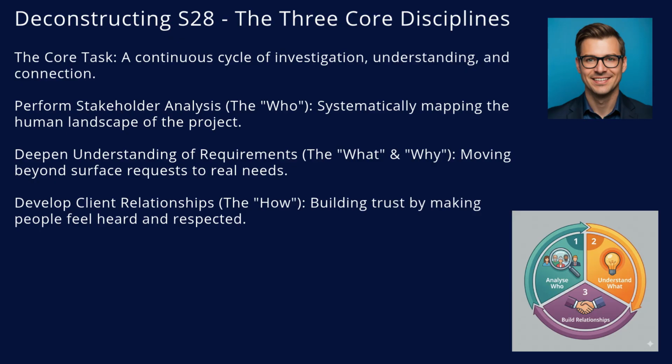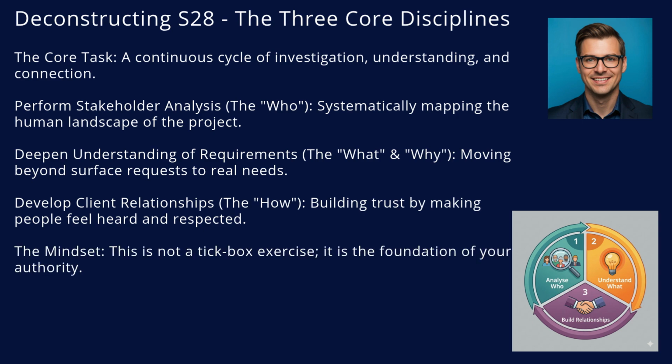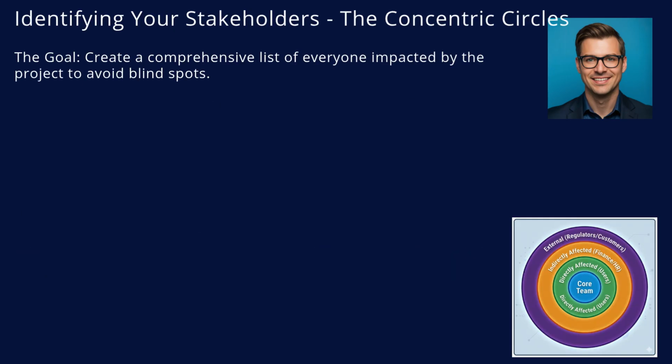By making people feel heard, you build essential trust. Adopting this mindset is vital. This is not a project management tick-box exercise. Establishing these connections and deeply understanding the client's business is the very foundation of your professional authority as a consultant. Our first practical step is identification. The goal here is to create a comprehensive list of every person or group impacted by your project, completely removing the risk of being blindsided late in the delivery phase by someone you forgot to consult.